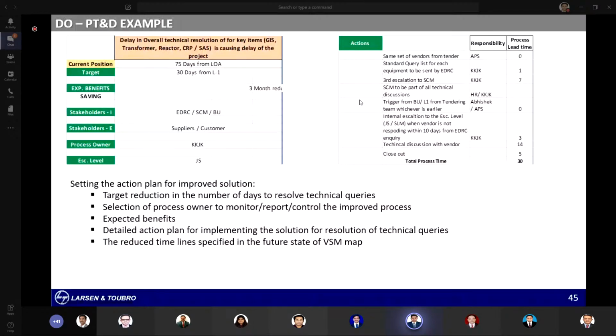But in our African projects, in many locations, my observation is that the coordinates also get changed during the execution phase. Whatever was fixed at tendering time, after handing over there may be a little bit of change due to the lines or due to the plot area itself. It is happening. This is the point we took up when we started the Tanzania project. We started with coordinate fixing and other things as the first priority. It gave a good yield, but over the period the client changed the overall layout, which impacted it differently. Yeah, this is a very specific reason.